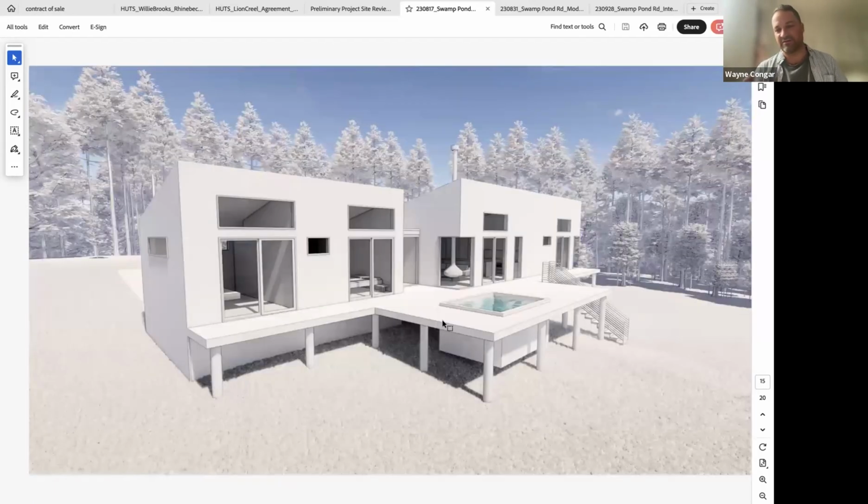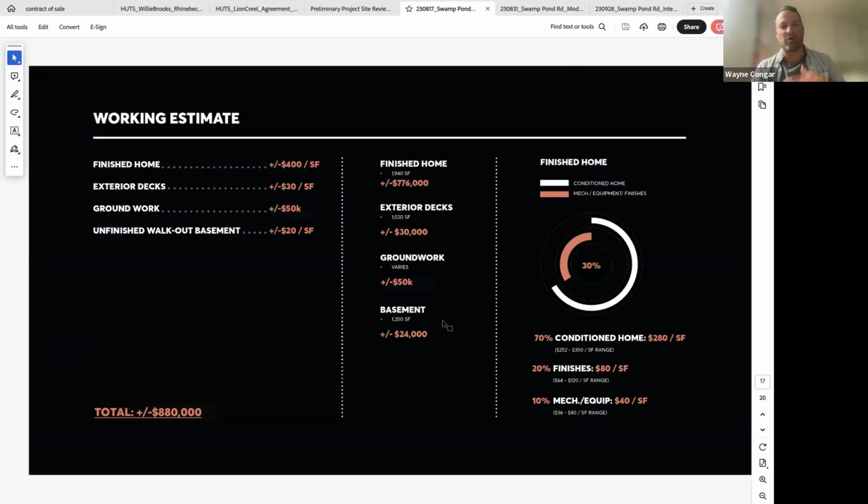So that's the general shape, and the first pass on the private side of the house, the resolution gets a little bit better, feels a little more like a feasible house. And like always, we started to put estimates to the project right away, utilizing our standard figures as an example, to put real numbers to what this thing would cost, to see if we need to scale it up or down, and not only reflect the design the client had in mind back to him, but also the pricing and the cost implications of that design.